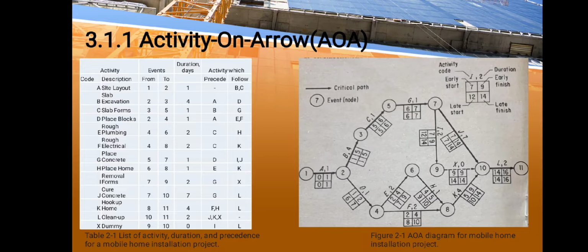Critical path. This is the longest interconnected path of activities through the network. Its length determines the overall duration of the project. All activities of the critical path have 0 float times. A project may have more than one critical path.